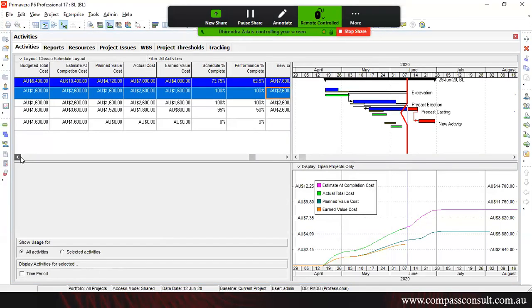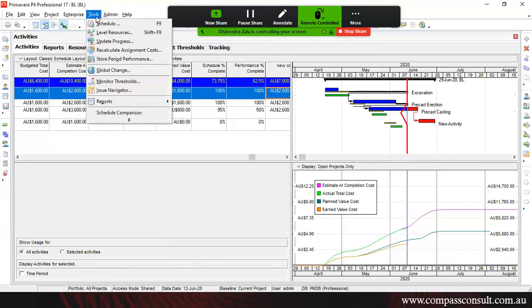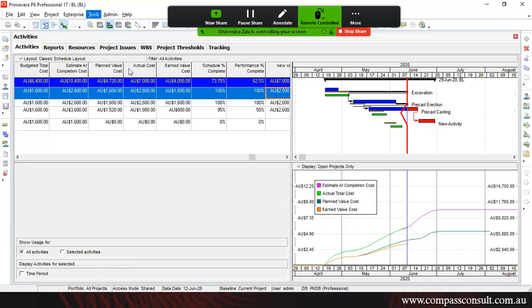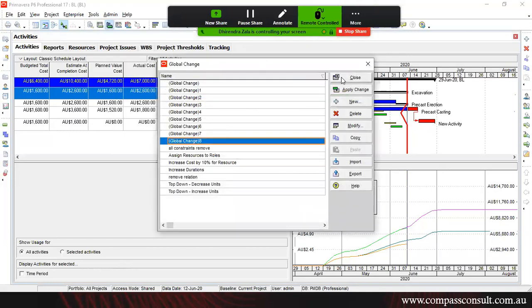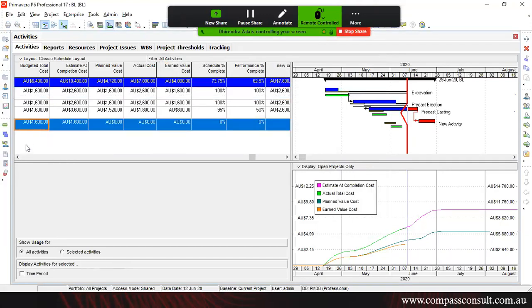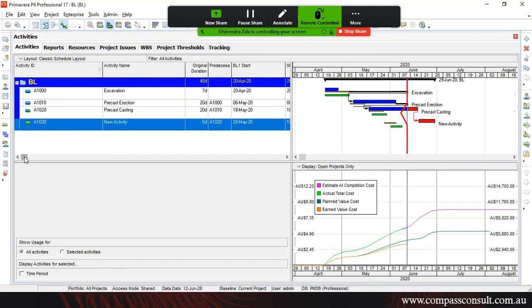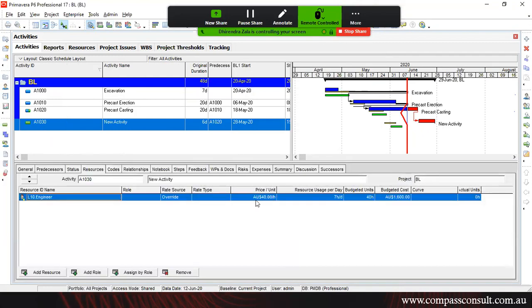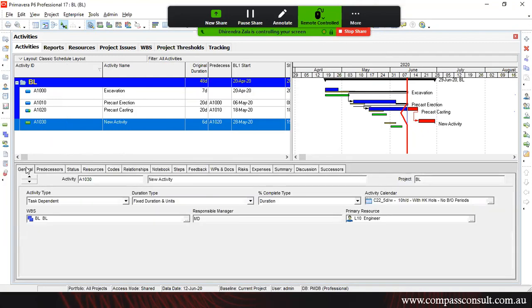Let me give you one more example. Maybe you will get a clear picture. See, I have to do one more thing. Whatever activities remain in planning or after doing execution, if management is taking a decision like that, guys, we have to pick up the duration, or pick up the activities while doing execution. Right now we are following a calendar of 5 working days. But management said, guys, start working 7/24. Means anyhow we have to complete this activity in 2 to 3 days.